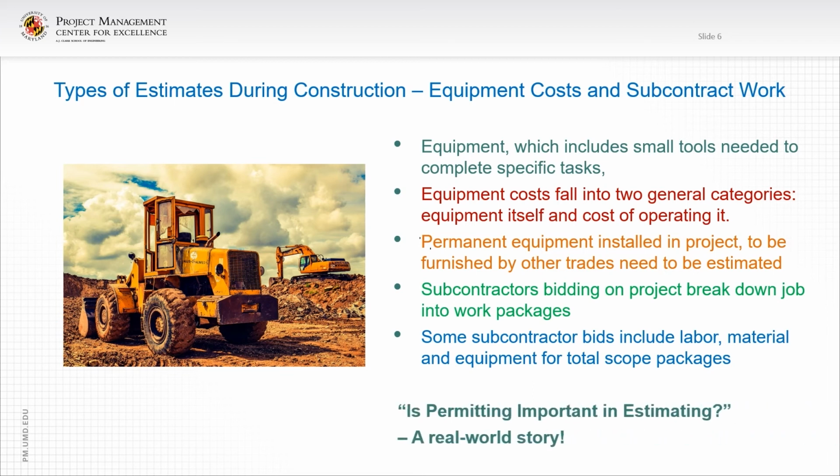And finally, let's talk about how permitting is important in estimating. Well, permitting is real critical. First of all, who pays for the building permits? And there could be multiple building permits and multiple buildings on the site. Who pays for it? Who's going to furnish it? And when? The timing is real critical. Are there multiple permits to be issued? And is the project going to be phased? That's another way of getting the project started if there's a delay on the full permitting.